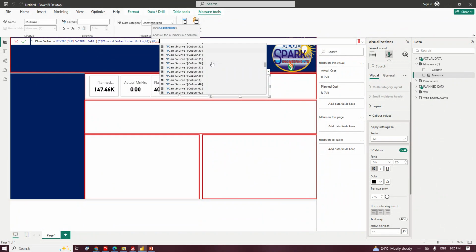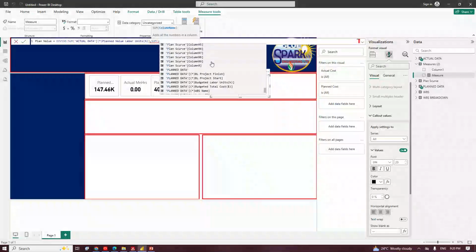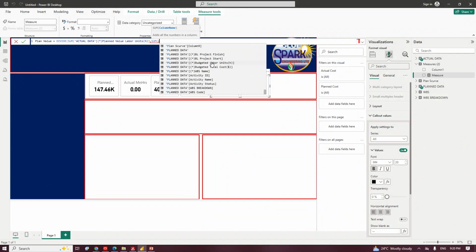Why not we bring the two, like the columns, you understand? Why is it now we are bringing same pieces of data, but we are bringing it in two places, in two forms? Okay, so one will be updated frequently, one will be constant. That's why we need to separate it. I don't know if it's clear.